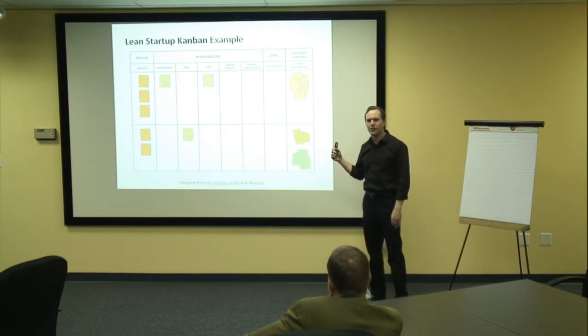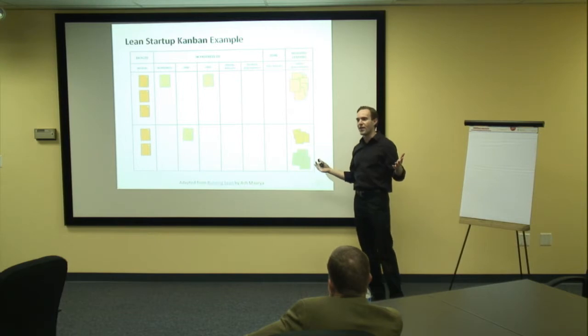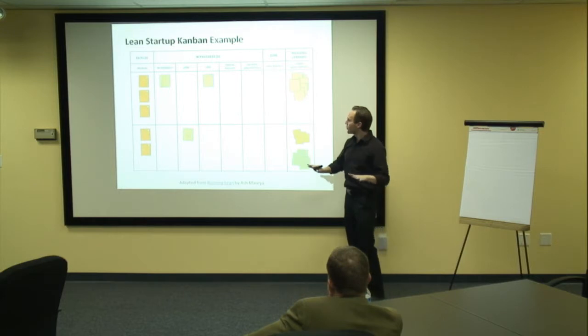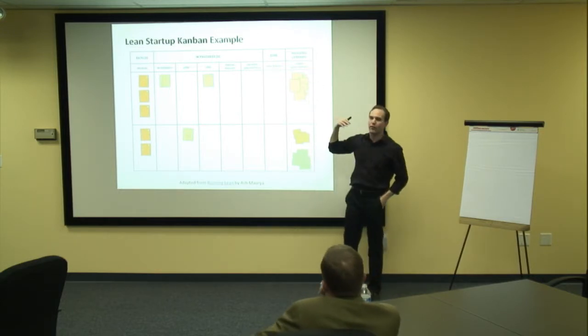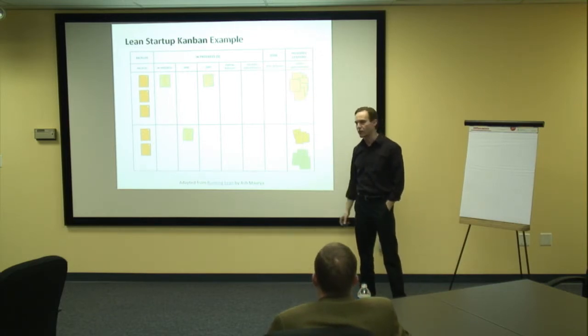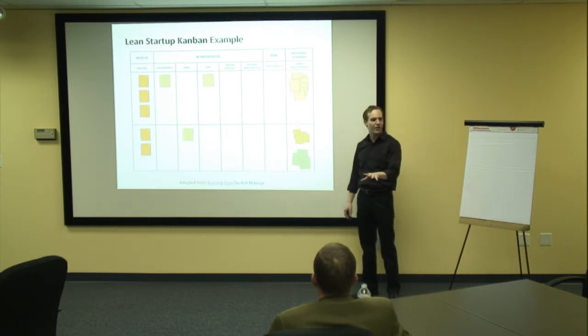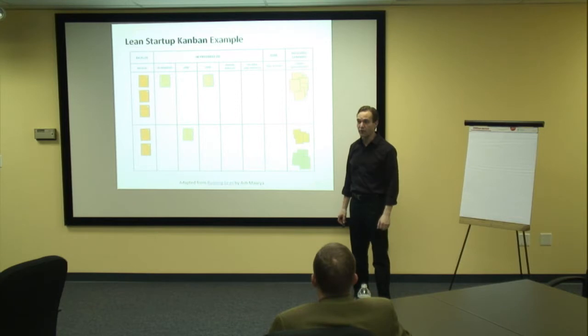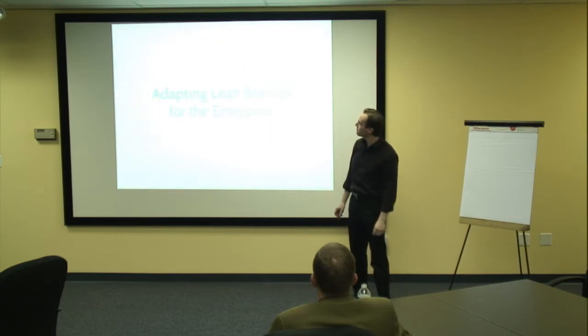If you're familiar with the concept of, let's say, IV&V, independent verification and validation: verification is, you did what you said you were going to do. Validation is, and it solved the real problem it was supposed to solve. Of course, not the same thing. So here it's validation. We're trying to go out there and make sure that we're, in fact, really achieving the objectives that we meant to once we release these features. Not just assuming the release is enough by itself. If you think of something like Google Labs, that in its entirety is, in fact, a validation queue. They're looking to make sure that people actually care about the products before they make them into real Google products.